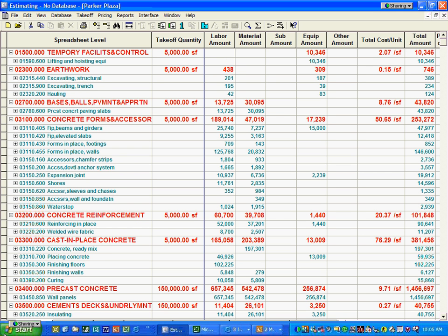The database that we're using for capital budgeting is RSMeans. RSMeans is a pricing service out there. It's also got 700 plus cost indexes for various cities across North America. And so we take advantage of all the power of that pricing, of those cost indexes, to provide that capital budgeting tool for the corporate owner.